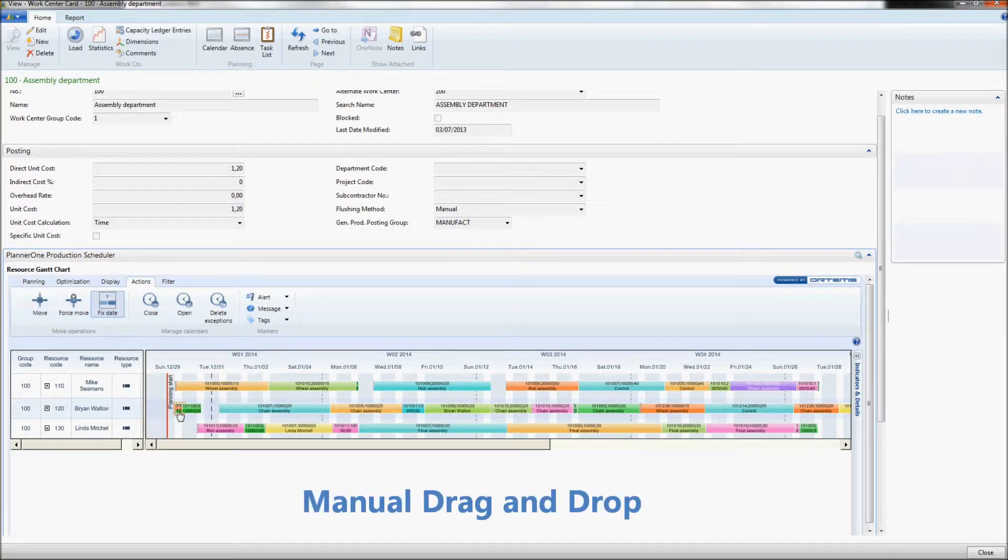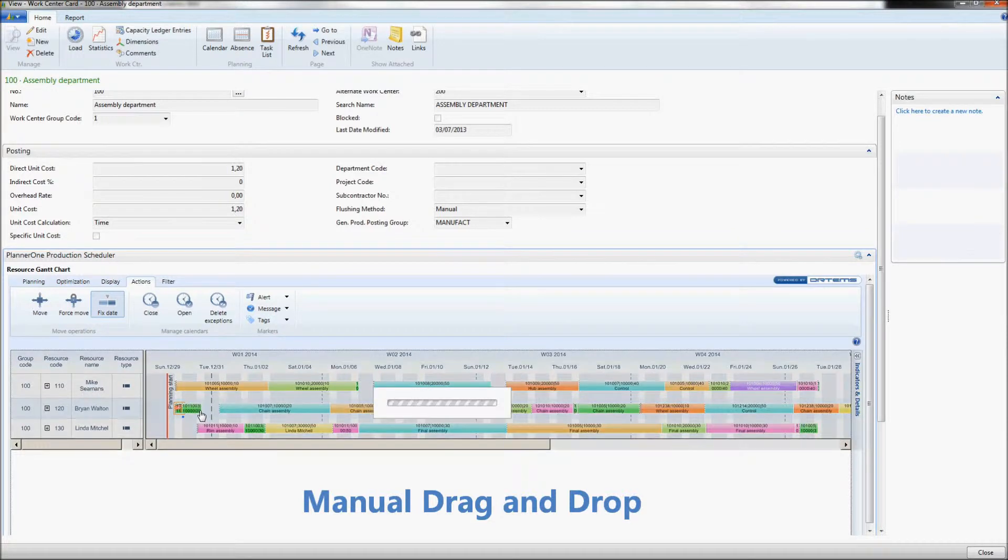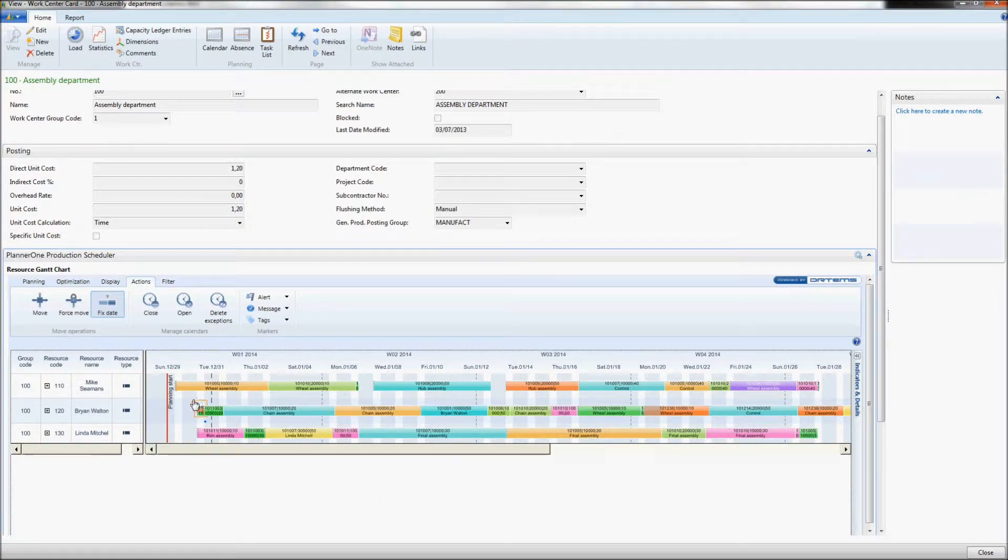The planner is now going to fix the operation depending on the arrival date of the missing parts. Brian can now see that the operation will not start until December 21st.